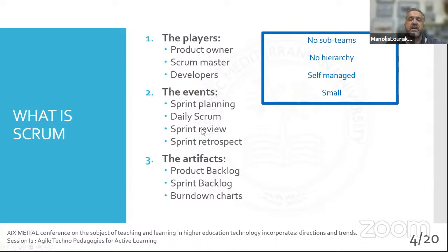And after this meeting, a very key meeting is with the team itself and the Scrum Master, not the other guys, where they retrospect what they have done correctly during the last sprint or what they have done wrongly, in order to improve for the next sprint. Also, in this meeting, they retrospect the tools they use, to find out if there is any need of changing the tools or using new ones.